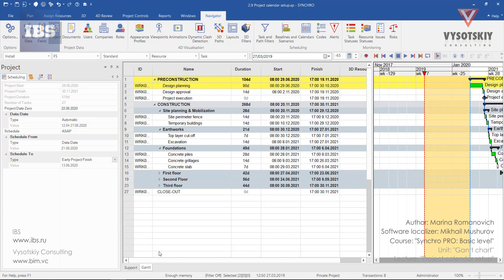To create a new calendar or edit an existing one, open the Navigator bar, go to Scheduling, and click Calendars.